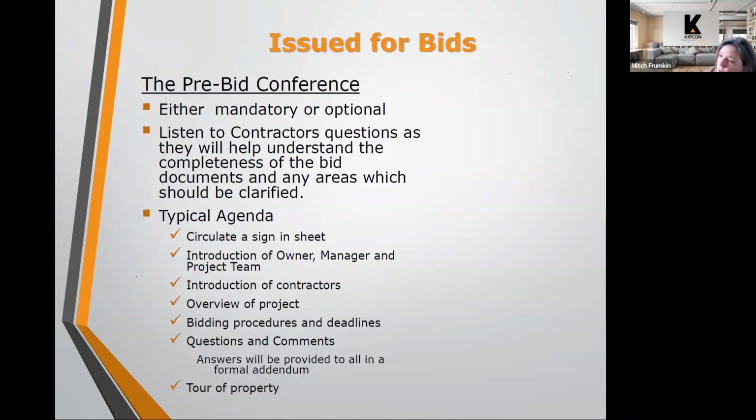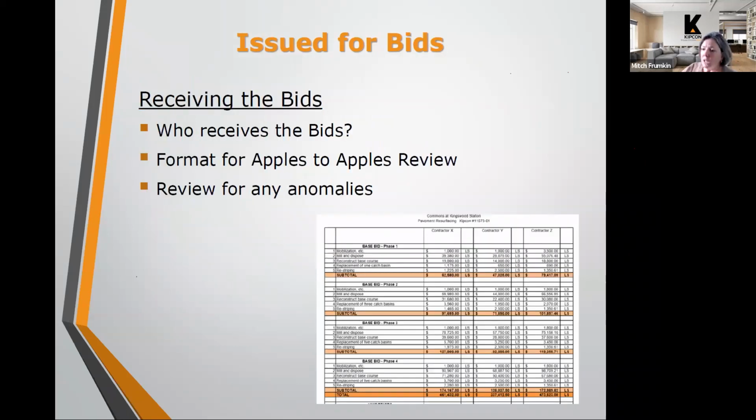So we discussed the pre-bid conference. Sometimes you can do it on site. I've been to bid meetings where all the bidders show up on a given day and we do a walkthrough, or else, as I mentioned, they are more often responsible to contact the owner's representative to get on site to have a look at what they're going to be working on. So then once we receive the bids, and I'm going to move fairly quickly through the rest of this, just in the interest of time.